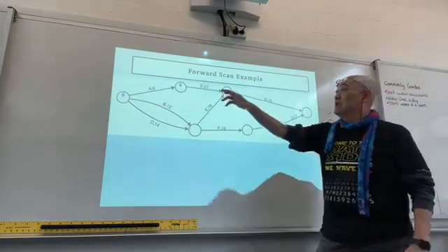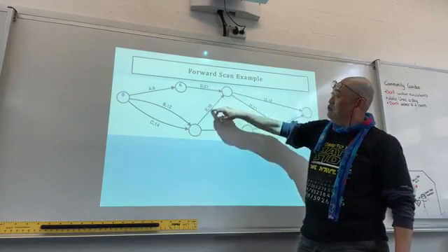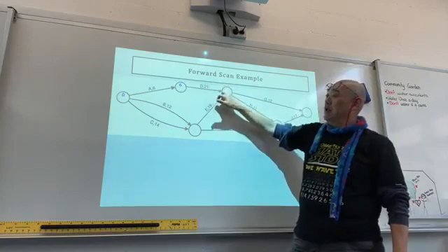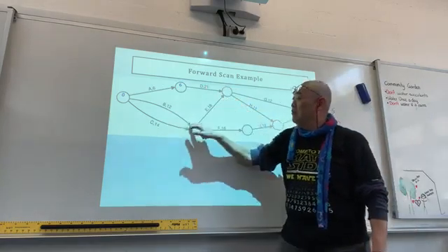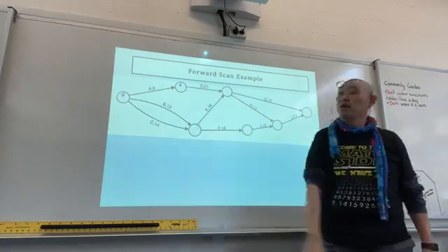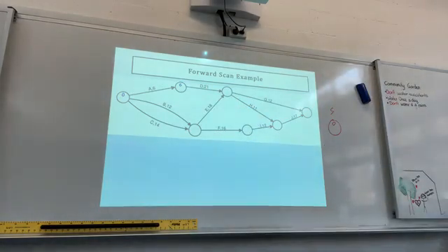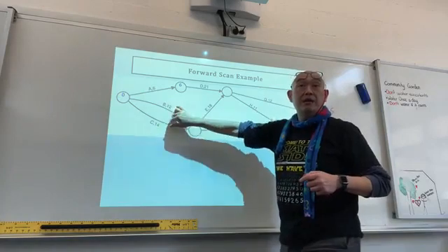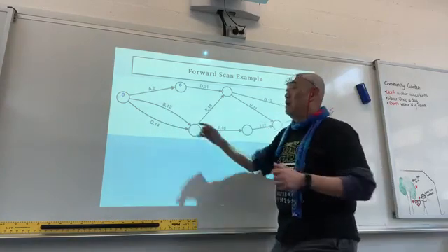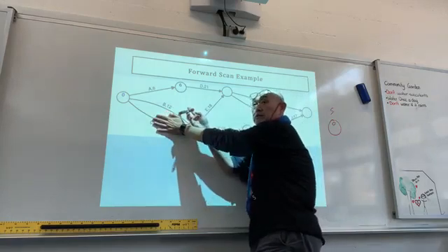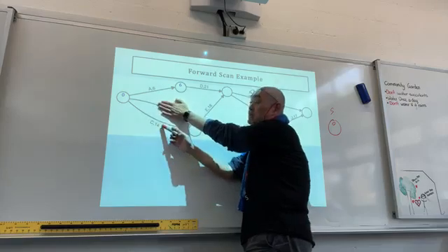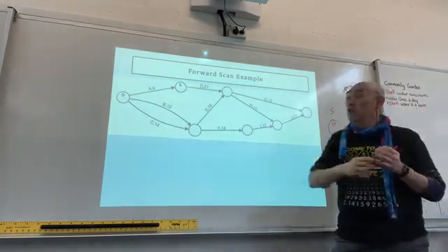Now, here I've got 2 activities that have to finish before this can start. So I cannot do this node yet. I have to look at this. B and C are parallel, correct? Before E and F can start, you know that C and B must complete first. How long does B take to complete? 12 minutes, maybe, or 12 days, or whatever. I didn't have the unit, so it's 12. What about C? 14.